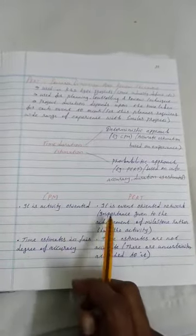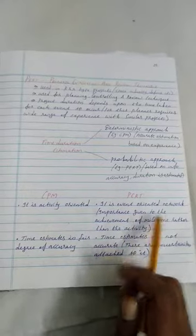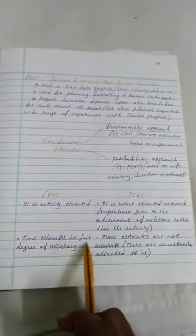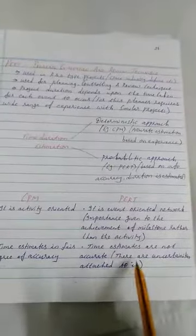Now we compare what is the difference between CPM and PERT. CPM is activity-oriented. PERT is event-oriented network. Time estimate in fair degree of accuracy. In PERT, the time estimates are not accurate here.